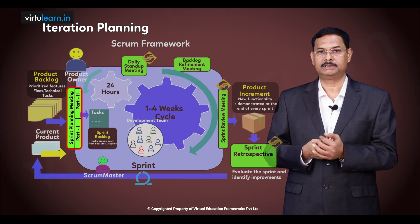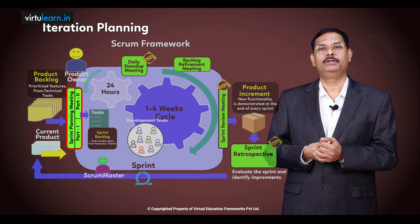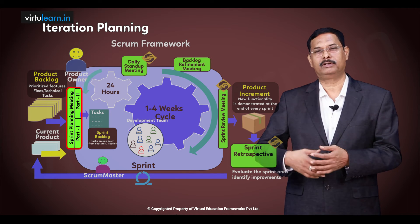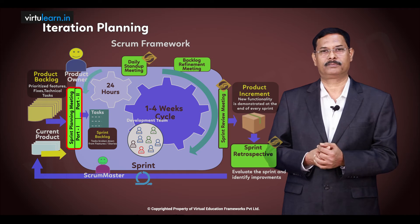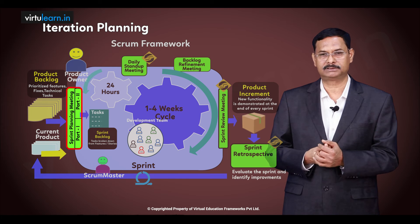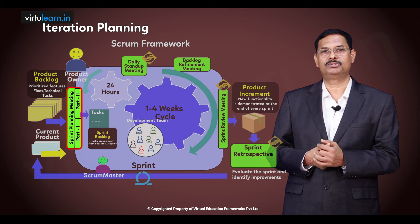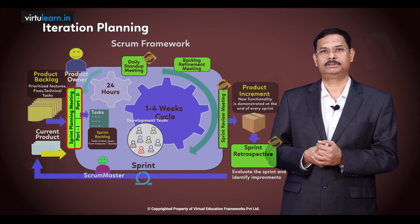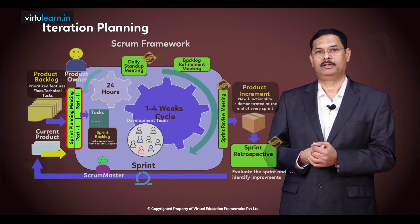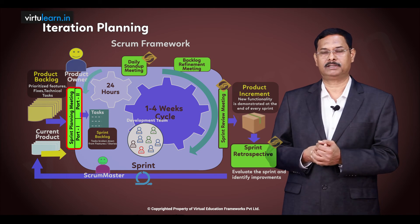Iteration planning has two parts. In part one, we select the stories that we want to implement in this particular iteration. In part two, we break down each of these stories into respective tasks. The list of these tasks is known as the sprint backlog, which is the output of the sprint planning process. The list of all the features and business goals are nothing but the iteration goals.